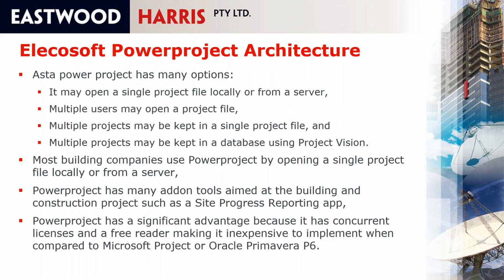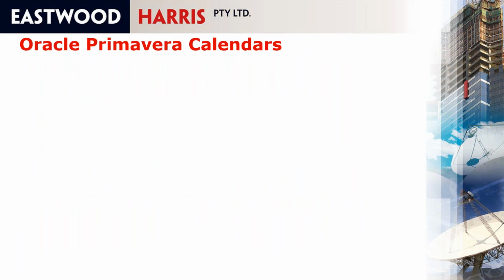Powerproject has a significant advantage because it has a concurrent license structure and a free reader, so it can be a lot less expensive to implement compared to Microsoft Project or Oracle Primavera P6. So if anybody is using P6, if they want to just view a file, they have to have a license, and it has to be a named license. Whereas if you've got people in your organization who just need to view a file, they can use the Powerproject viewer, which is free, and therefore it can be a lot less expensive to implement than either Microsoft Project or P6.